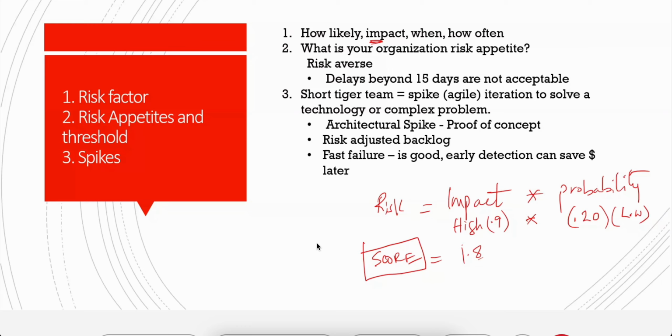So now that you have the score, you can use that score to make decisions. Same thing for risk. If you know the probability and the impact, you get a score, then you can make some decisions on the score. If the score is high, maybe you'll say, I'm going to put some money aside in case we do have a hurricane. Just in case there's an impact, we may have to replace some stuff or repair some damage. I'm going to put aside some money based on the score.